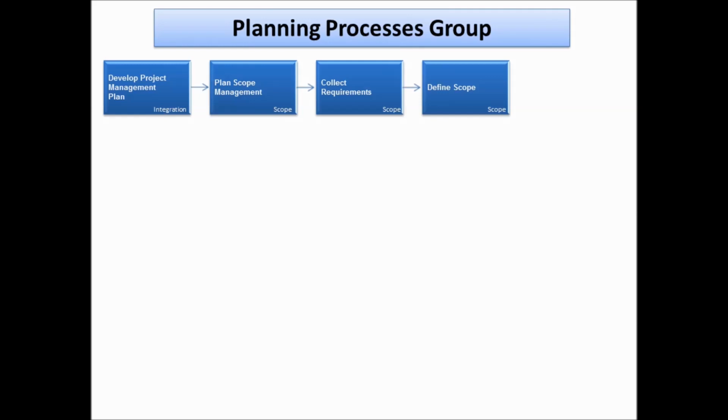and come up with a project scope statement. Remember, a good project manager will make sure that there is absolutely no ambiguity in terms of scope, which means there are no gray areas on what's in the scope and what's out of the scope of the project. Now, remember, the project scope statement should have various things in it, like deliverables, constraints, assumptions, justification, success criteria. All these would be defined in the project scope statement.